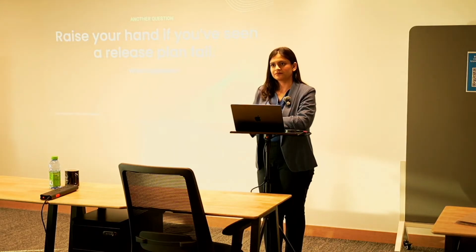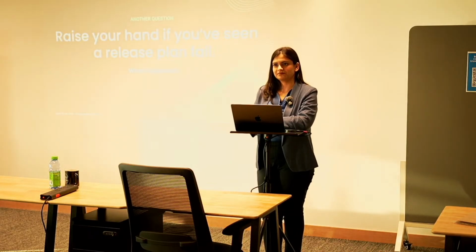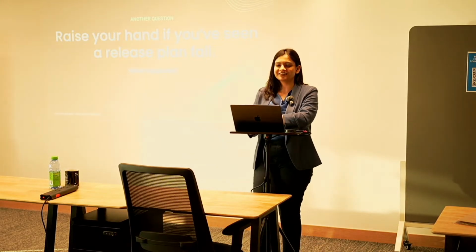So discoveries and all those things take time, and not spending enough time understanding what those problems are and how much time they can cause can derail everything. Because then on the go, you need to do a lot of discoveries, and those things may be the most critical part of your application, and then you don't have any solution for them, and your project is completely bust. That is one of the things which I have faced in my development work. Great call out.